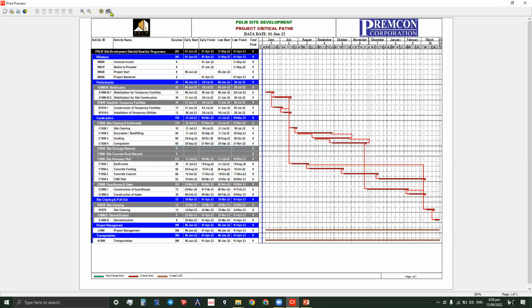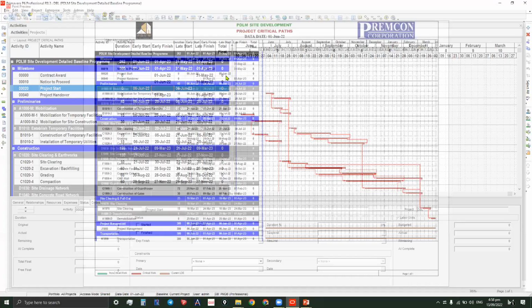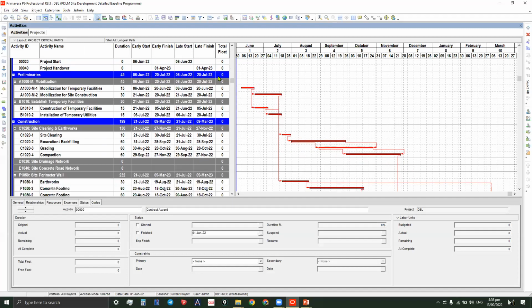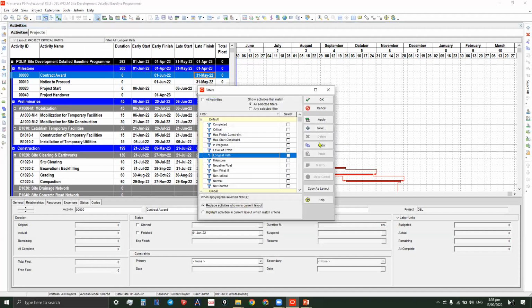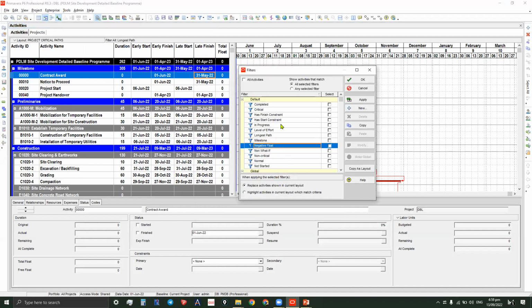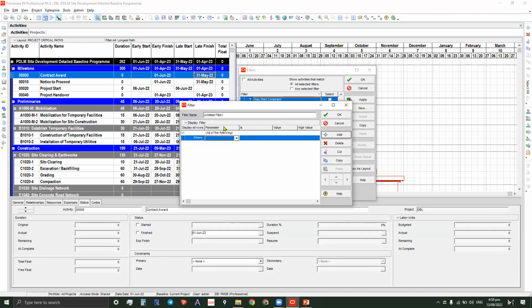What else we need to do here? Okay. Since this is a critical path, we have to filter this as critical, the critical activity should be filtered where the total float threshold. So we will go to filter, customize, and then we will go to critical. Okay. No, you have to select, let's say we have to select our own new, let's say we will rename this filter into critical path.